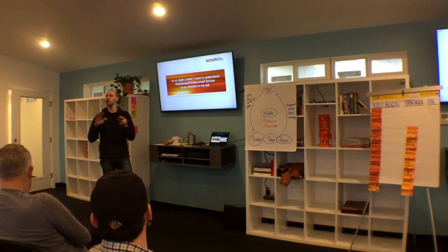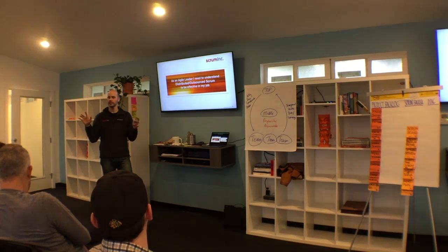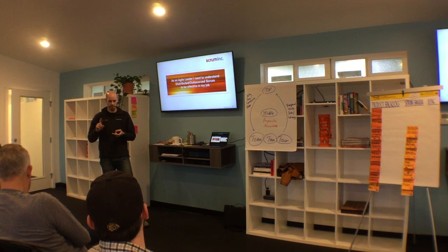Now do note there's no new meetings. None. Scrum of Scrums is just daily stand-up repeated. Meta Scrum refinement is just product backlog refinement repeated. Meta Scrum planning is just sprint planning repeated.